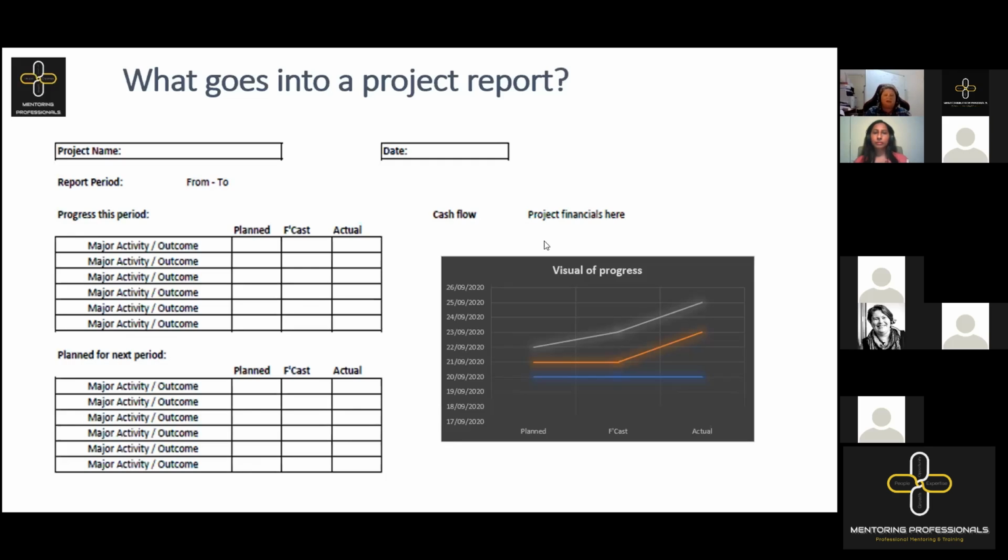Yeah, at a glance, red, amber, green. And when we've used those in the past, we'll typically have that timescale and cost of the two red, amber, greens. If our project is green, it means that there is no problem. But if we have a red or an amber, then obviously risks and issues are coming into play.